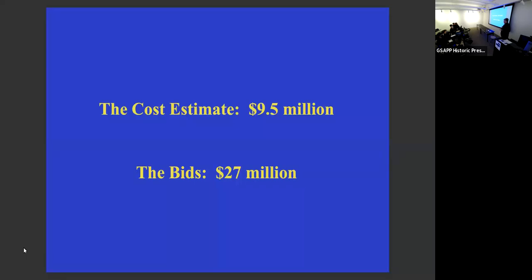It's the largest cast iron restoration in New York City, certainly. I don't know whether there was another one outside of New York, but this is big, and this was a daunting one. So ultimately, what we ended up doing was negotiating it together with all three firms. All three major cast iron firms, Historical Action Castings, Robinson, and Allen Architecture Mills, got individual chunks of the project. And the documents had to be separated into those different chunks because we needed to do it.